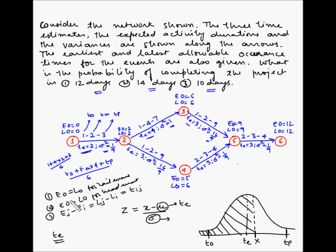For activity 1-2: the tail event has EO = 0 and LO = 0, so condition 1 is met. The head event has EO = 2 and LO = 2, so condition 2 is met. For condition 3, EJ minus EI = 2 minus 0 = 2, and LJ minus LI = 2 minus 0 = 2, which equals Te = 2. All three conditions are met, so activity 1-2 is a critical activity.